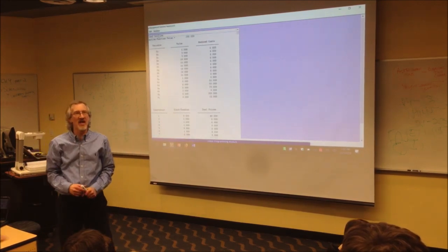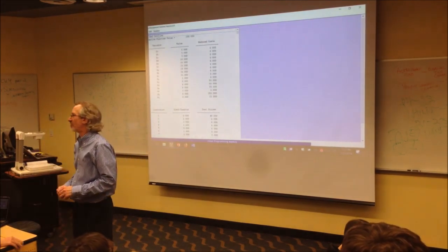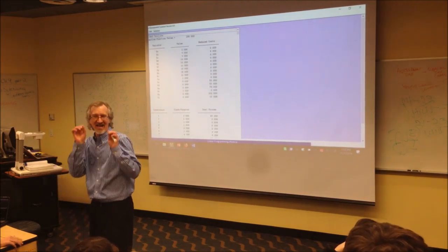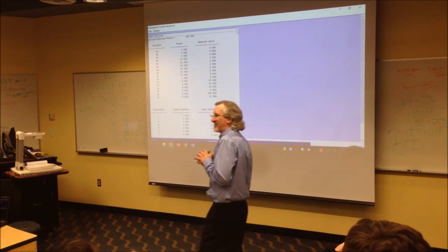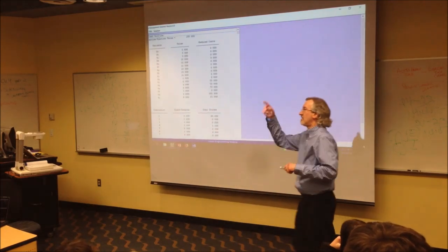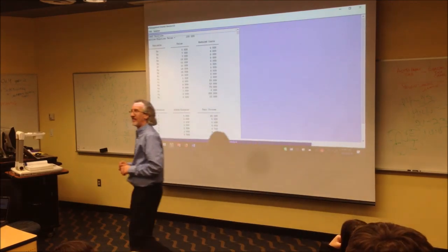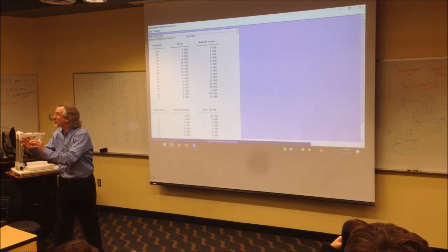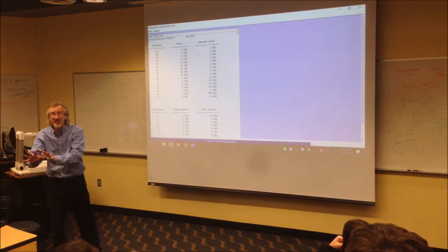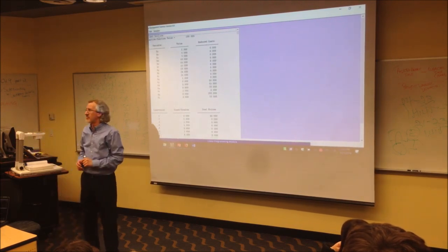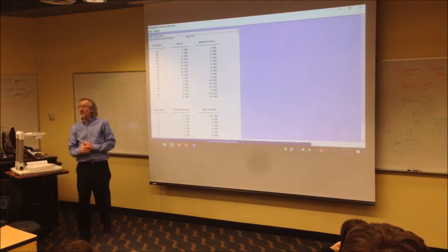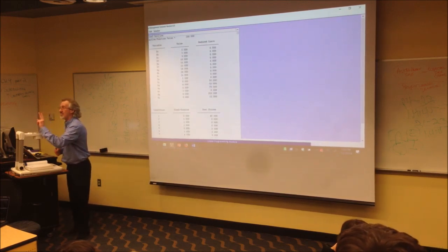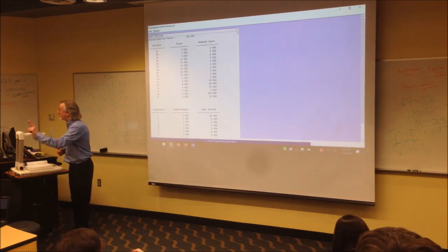How did he know it was A and F? What do you see on A and F? What made him decide that's the activity being crashed? Because the Y variables represent the crash. You go straight to the Y variables and look at their values. All the Y variables have zeros except for two of them, A and F.